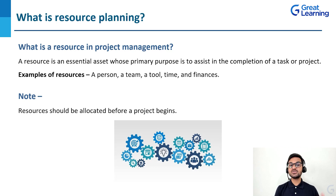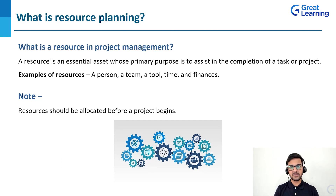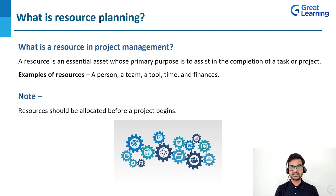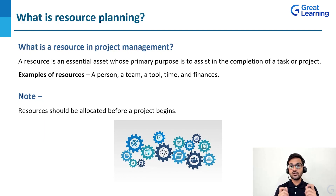Resources should be allocated before a project begins. Imagine that you have a project going on and in the middle of it, you realize that to do a particular task you need eight people but you actually have only six — that will be a mismatch. In order to make sure that we are going in a smooth direction, you have to allocate and estimate the resources before a project begins. If you do it in the middle, you may have to redo the entire work due to bad consequences. Always make sure you have proper estimation, forecasting, and allocation of resources for each and every task before the project starts.